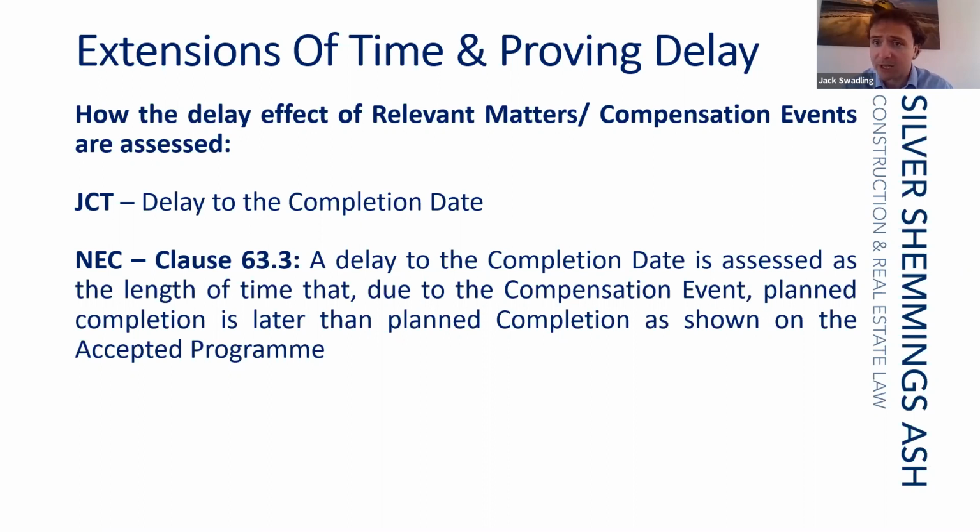So you'd be looking at that under section 4 of the JCT. But the only thing that's important is delay to the completion date. Brief mention on the NEC under clause 63.3. A delay to the completion date is assessed as the length of time that, due to the compensation event, planned completion is later than planned completion as shown on the accepted program.